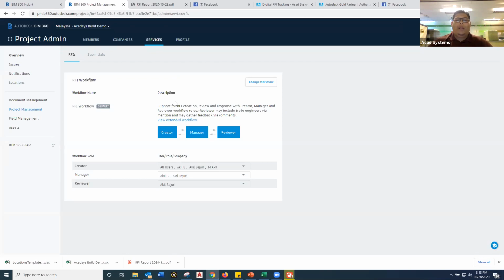In the RFI workflow, the process is very straightforward, the same as what people have been doing on site. The site personnel will produce an RFI report, a general report, and then submit it to the officer, and that officer or manager will submit it to consultants for review and responding. The assigned consultants usually will reply by email, or by printing out the data or drawings needed, or by submitting a soft copy through common cloud storage like Google Drive and so on. That's a common workflow, using hard copy and your bare hands to manage all the data and papers.